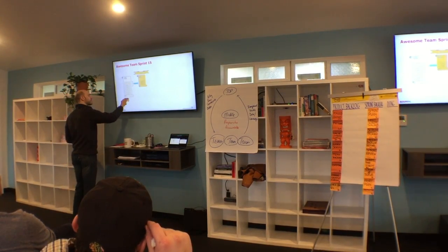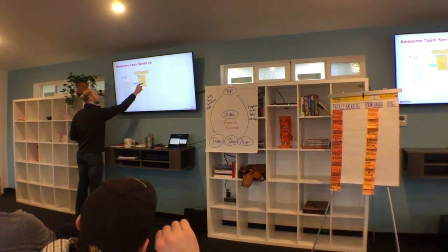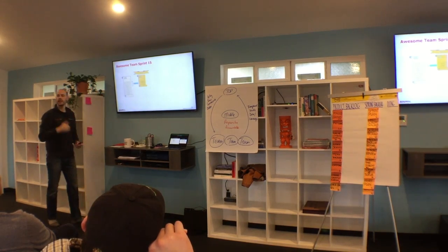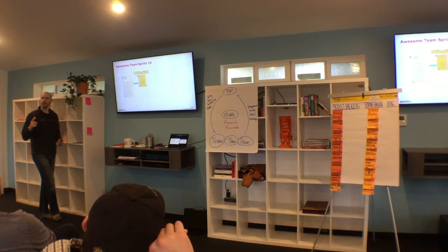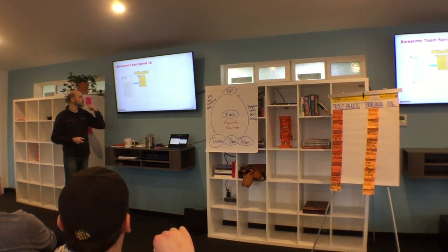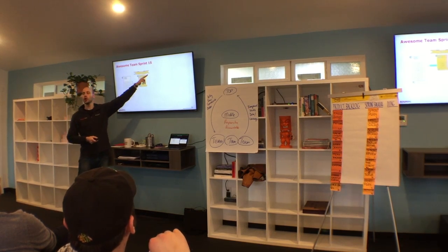So this is all estimated. So the product owner is going to try to swap items of similar size to make a better demo that is more exciting and reduces risk. This is actually the critical part of sprint planning. From that, the product owner is going to write the sprint goal.